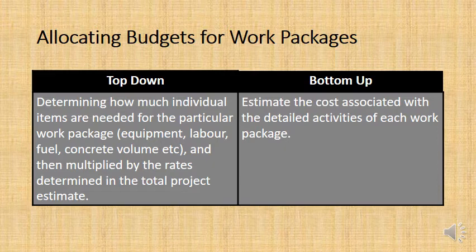I will budget $10,000 for installing the windows, for the establishment of the crane. Avan, who's budgeting for the lifting of masonry blocks, will include $10,000 for the establishment of a crane when she budgets for her work package. And Taba, who's budgeting a work package for lifting up pipes and services and wire, will budget in $10,000 too. And so the budget actually exceeds the overall cost that we're actually going to face. We're only going to establish the crane once.